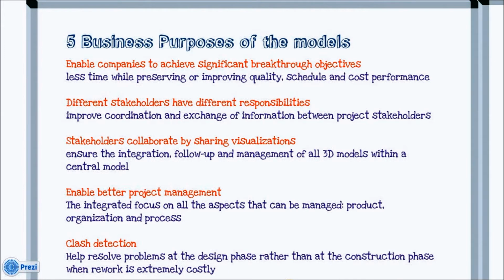Third, stakeholders can collaborate by sharing visualizations. The model strongly emphasizes the use of models that can be described to and evaluated by multiple stakeholders. It ensures the integration, follow-up, and management of all 3D models within a central model. The 4-dimension links construction planning with the element of time. 4D models allow our customers to visualize and optimize project phasing and construction sequencing.